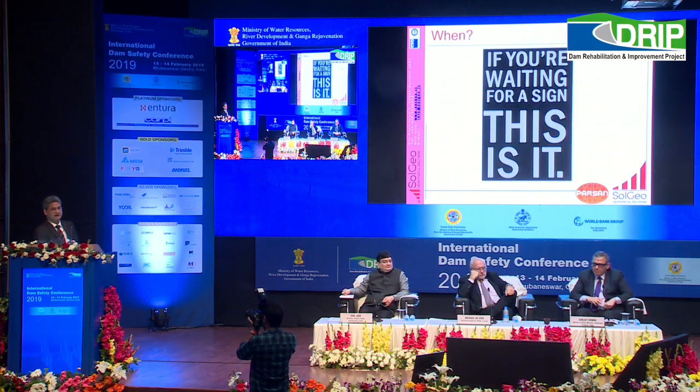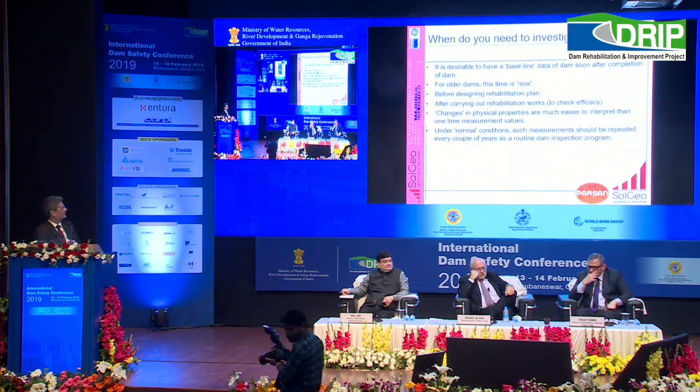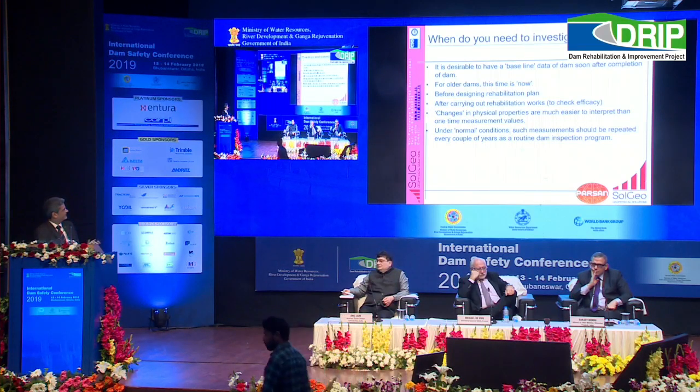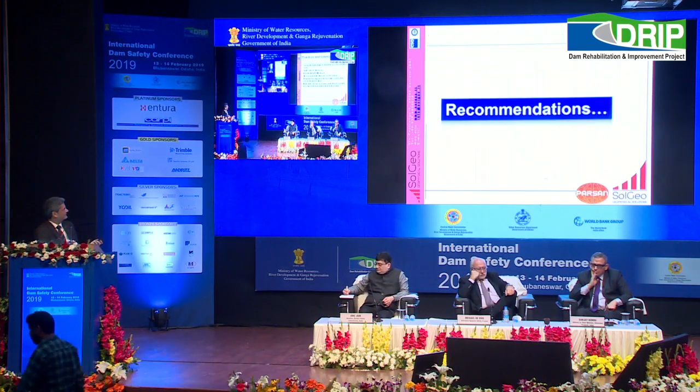And the point is that every dam ideally should have baseline data as soon as it is completed, so that you know the health of the dam at the time of completion and can keep comparing it later. If it has not been done at that time, the time is now. So practically every major dam should be checked for its health.